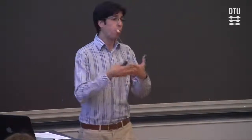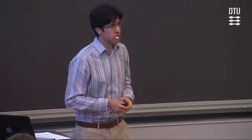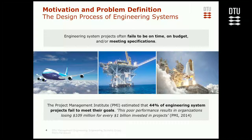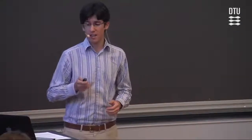To introduce this, we start with why we are looking at this topic — the motivation and research approach. A key issue that motivated this research is that engineering system projects often fail to be on time, on budget, and meeting specifications, even when there are plenty of resources available and great engineering teams. This happens with things like the design of airplanes, large energy projects, and many other types of projects. Large amounts of resources are wasted — the PMI, the Project Management Institute, estimates that 44% of engineering system projects fail to meet their goals, translating into around 10% of resources wasted.